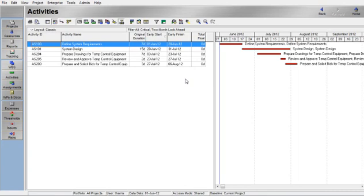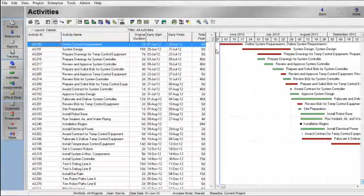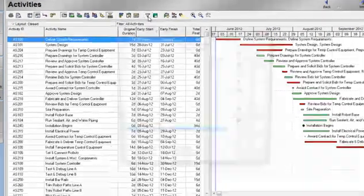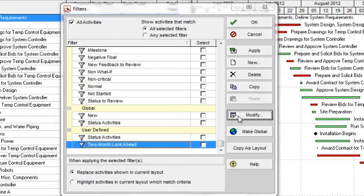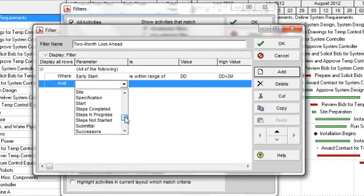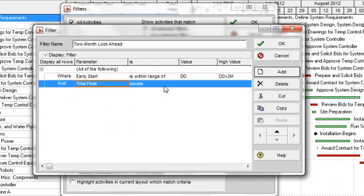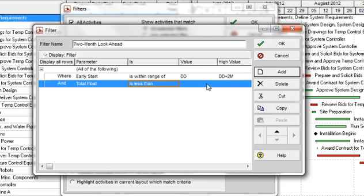Another way of achieving the same result is to apply several parameters to the same filter. Click on the filter button, click on All Activities, and click OK, so again we are filtered to all activities within the project. Click on the filter menu button again, select the Two Month Look Ahead filter, and click on Modify. Click on the Add button — another line appears that begins with And. Select Total Float from the drop-down menu. Select Is Less Than from the Is menu.